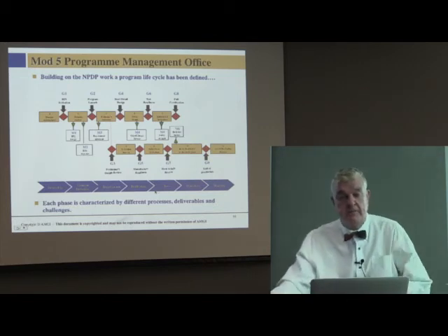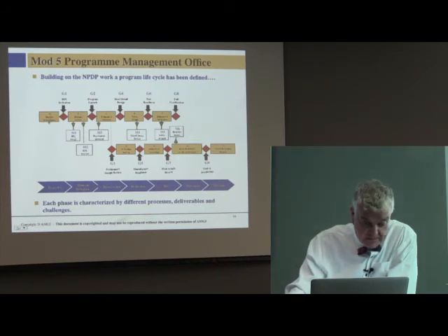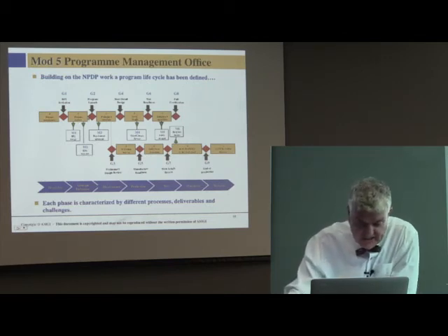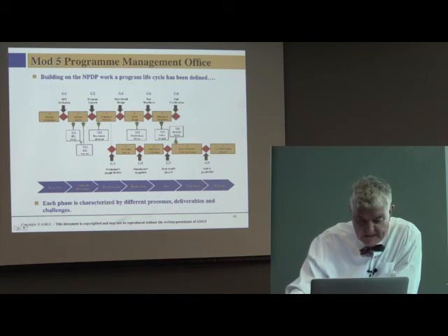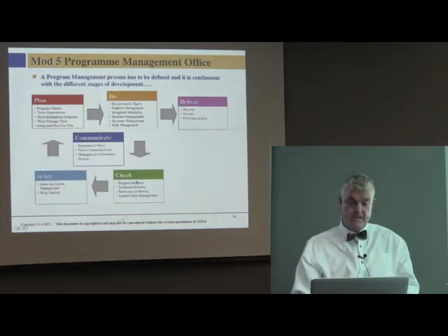And then you're using that phase milestone process. So this happens to be, again, landing gear. So in this phase A is business development, phase B business capture, phase C preliminary definition, phase D detailed design, phase E validation, and then these are mini milestones. And this is the bigger picture phases. Each phase is characterized by different processes, deliverables, and so on.